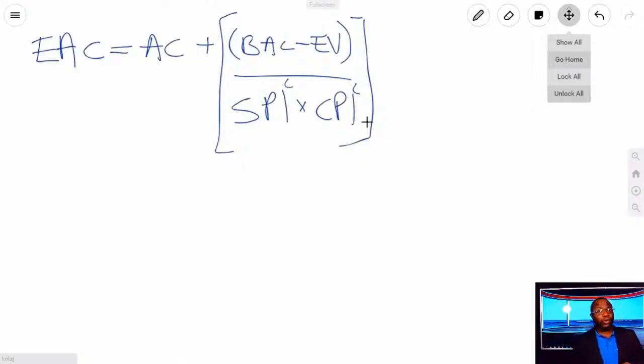So day 1, if all you've got is day 1, you just use day 1 like we did. But if at the end of day 2, you got these metrics, you have to use them. So we are using the metrics for day 1 and day 2 cumulative. If you use just day 2 on its own, you're going to get the answer wrong. You got to combine them, folks. And that is the big thing about the EACs. It is cumulative.